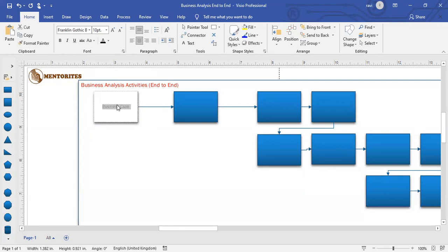So what we do is we prepare a business case. In the business case, we'll list out the different reasons why we want to upgrade, what the opportunities are, what the risks are if we don't upgrade, and how much additional expenditure we need to incur when we upgrade. We prepare all these details, and then we prepare a business case.